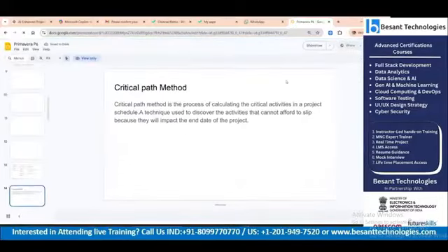So that is called work breakdown structure. Below work breakdown structure, we have further split into manageable parts called activities. After creating activities, we don't stop. We have assigned relationships. For what purpose?